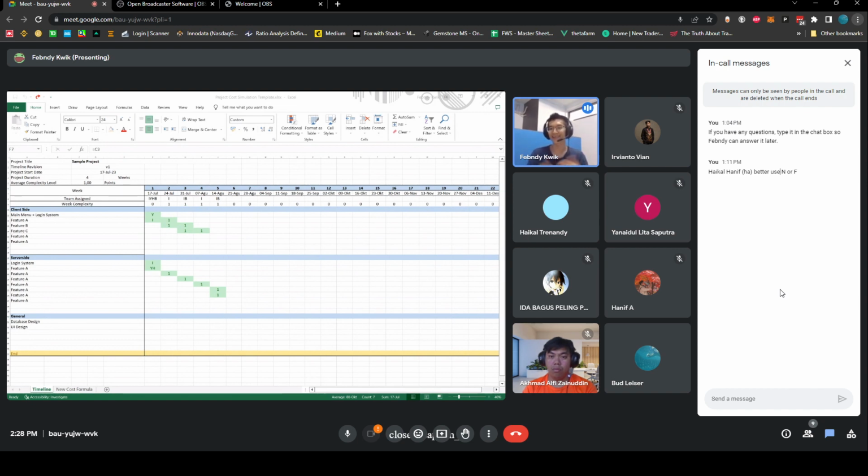While I'm doing that questioning, asking about what they did in the past few days, the other team members can start working right away. What do they work on? They already know from the timeline. For example, on the 20th of July, I have to do these features, I have to do those features. If they take a look at their timelines and see they don't have anything to do today, they follow up with the project manager. Each team has one or two pieces of this timeline, so if they finish one, they move on to the other.